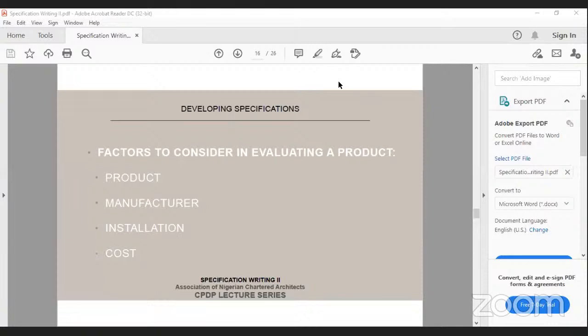You are on a site and you see that the site is fitted with expatriates for installation. Now, unless those products are absolutely necessary, as the head of the design team, it's advisable we go around them and pick equal but more readily available products.